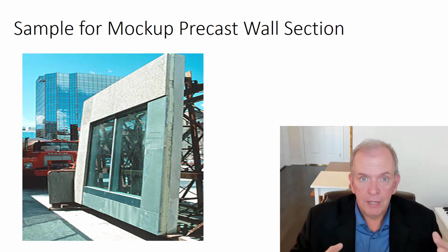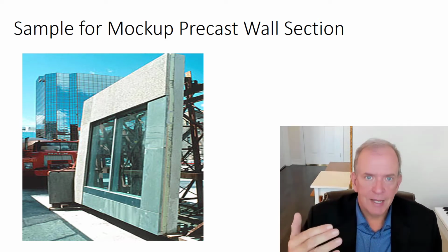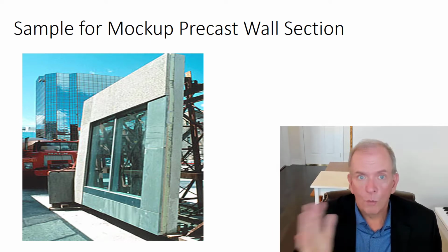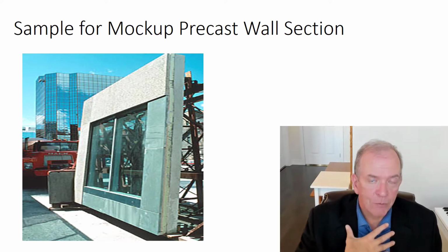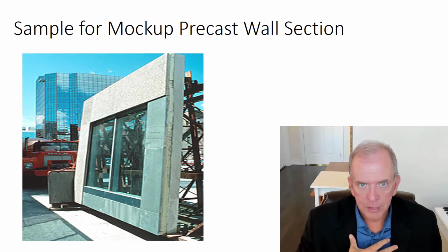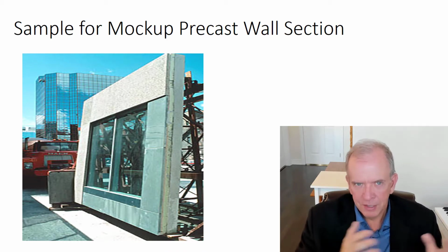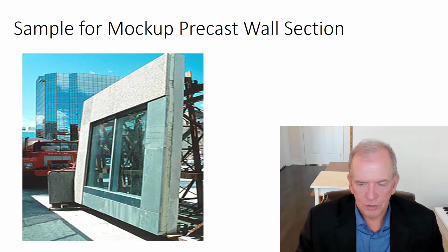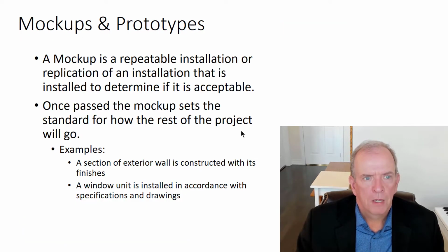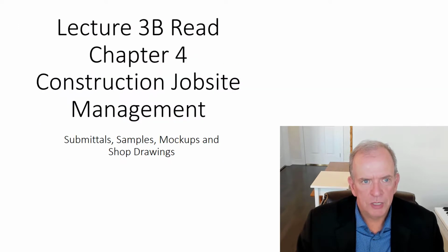So it was good for having that mock-up because they caught it, and it was only that one window. So that way I got to fix that and not do it in a whole bunch of them and have to go back and fix them, because that was my fault for not understanding the specifications, not reading them really closely, and being complacent because I'd done so many previous projects the same way, and then something changed. So that's mock-ups and prototypes so that you get that passed, and then it sets the standard. You can fly with it then, and it makes it much easier.